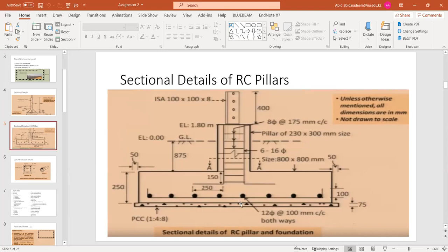In this case, assuming that we don't need to provide supports and the soil is quite stable, maybe a hard clay mixed with some sand, for a height of a little bit more than 1 meter this soil can stand on its own. Or, to make the side excavations more stable, you can excavate in the form of a slope as well. But in that case, of course, you will need to do more excavation. Work will increase. But it all depends on the working conditions at the site.